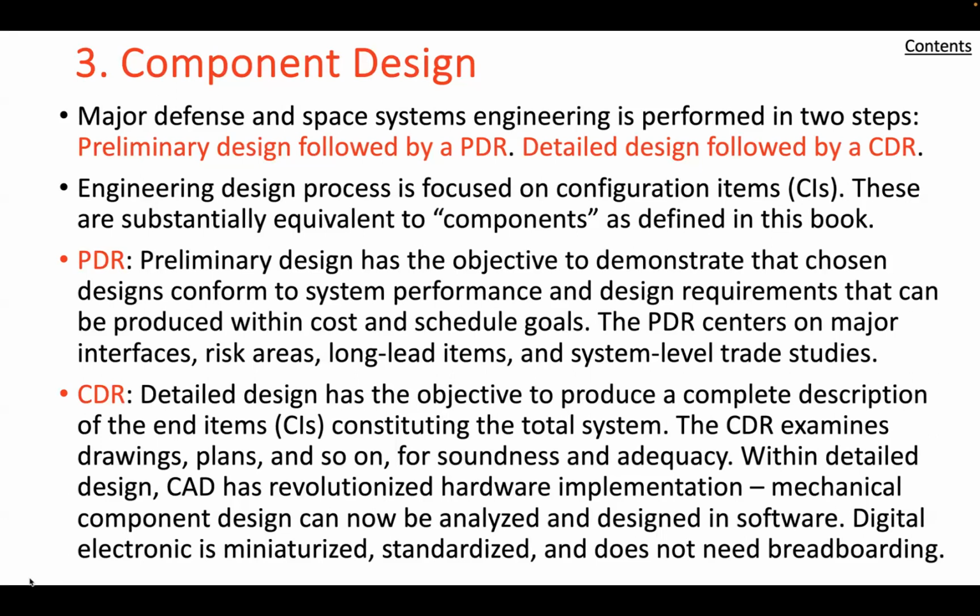Then we get into detailed design. The objective of detailed design is to produce a complete description of the end items constituting the total system. For large systems, a massive engineering effort is required to produce all of the necessary plans, specifications, drawings, and other documentation necessary to justify the decision to begin fabrication. The amount of effort to produce a detailed design of a particular component depends on its maturity, that is, its degree of previously proven design.